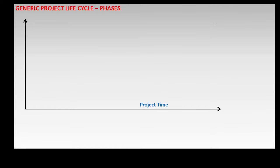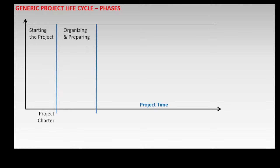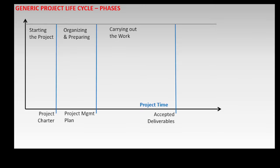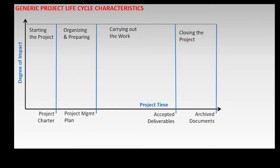The phases of any project can be mapped into the four generic project life cycle phases defined by PMBOK, which are: starting the project, with the output being the project charter; organizing and preparing, with the output being the project management plan; carrying out the work, with the output being accepted deliverables; and closing the project, with the output being archived documents.